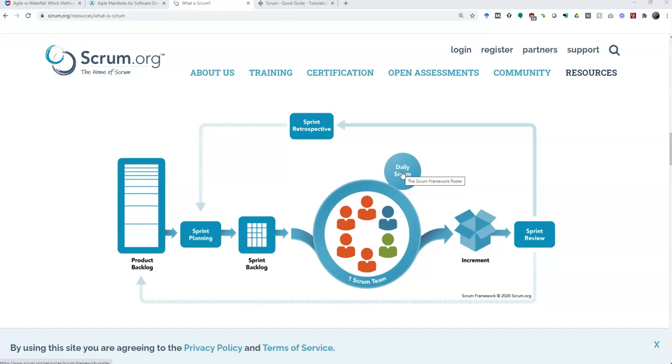This is what I plan to do today. And these are the things that are causing me problems. These are my obstacles. These are the things I think are standing in my way of doing the things that I need to do today. And each person does that.